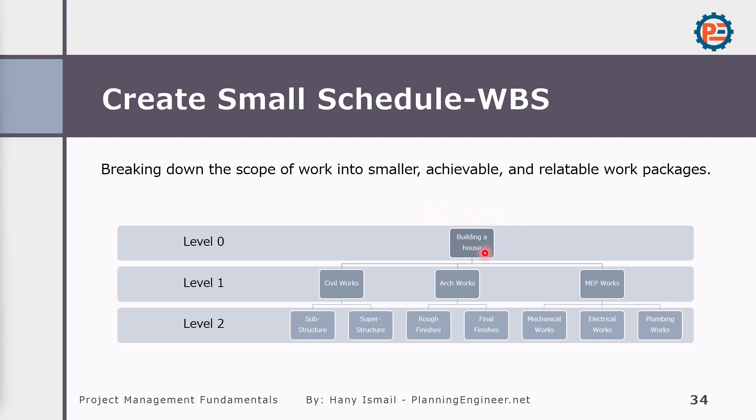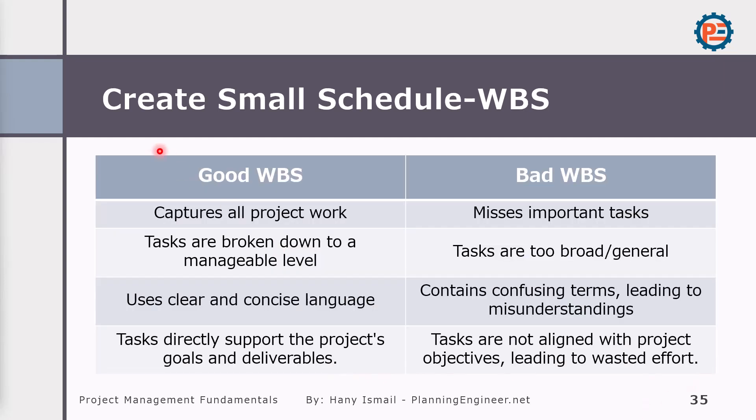Like here building a house, this is a level zero of WBS. Level one will be civil works, architectural works, MEP works. Under level one, we'll have level two. Under civil work, we can have substructure, superstructure. Under architectural work, we'll have rough finishes, final finishes, and so on. Under the latest WBS, we can add our activities.